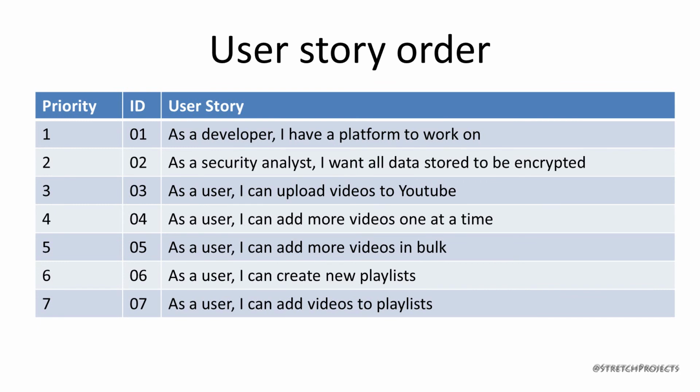This will often follow a very logical order, but it is also possible that business requirements mean that some things need to be produced in different orders. So if security is a huge issue for the product owner, they could assign a higher priority to any user stories which are related to security than they may do for other stories, which they deem less important.